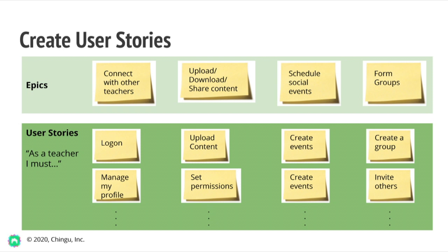Now, since you're following an agile methodology, you'll be deferring detailed design, coding, and testing to later sprints. Remember, we're doing the right thing at the right point in time. This means your backlog is a living document that is refined throughout the life of the entire project.